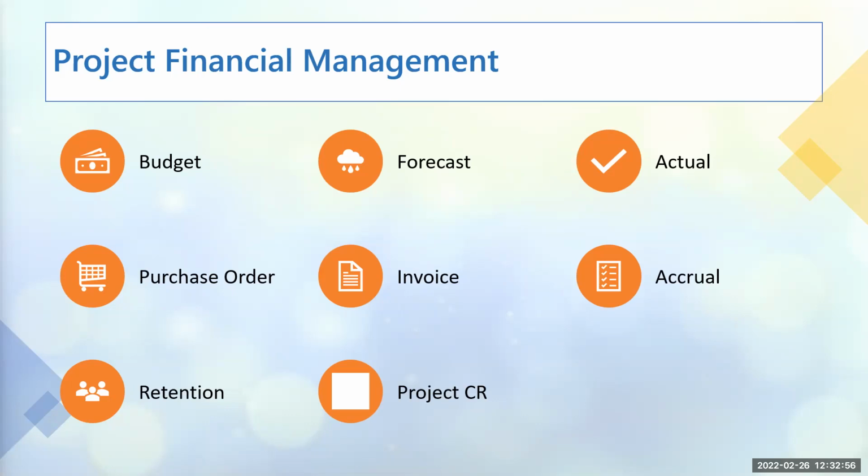Yes, every organization will be different in the way they manage their budget or their funding for the projects. Forecast will always change, but yes, forecast is a prediction, an estimated spend. Let me put it that way. Like I explained earlier, you profile it. They've given you £12,000 to spend in 1 year for the project. You now estimate and say, I need to spend 1,200 in the first month. I need to spend 2,000 in the next month. I need to spend 5,000 or 4,000 in the next month. So you are estimating it. There's every probability that this might change as the project progresses, but that is the best estimate.